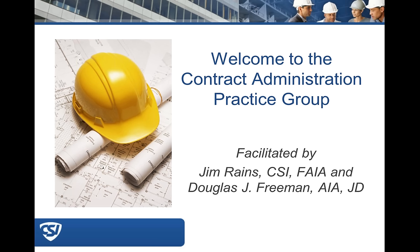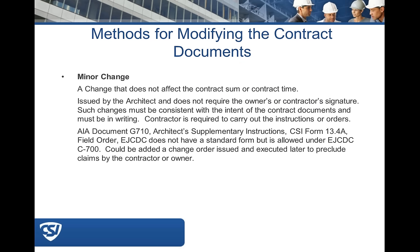When an owner or architect initiates a change, it's typically done with a change proposal request. The contractor responds or initiates a change with a change order request. We're going to move into talking about the minor change that the architect can make — one that does not require a written change order. A change that doesn't affect the contract sum or time, the architect can issue via AIA document G710, Architect Supplemental Instructions.